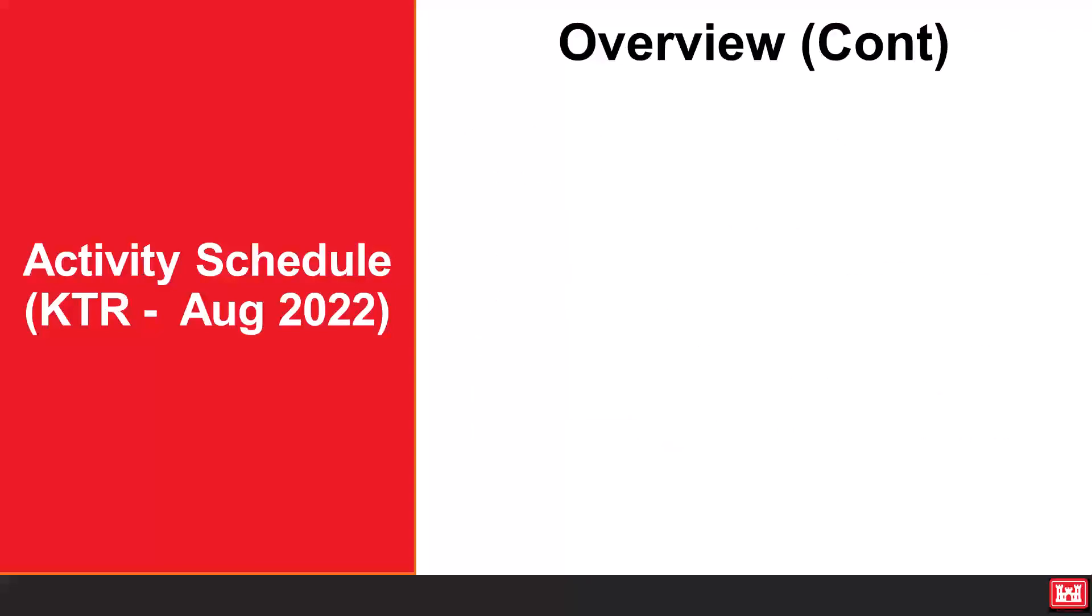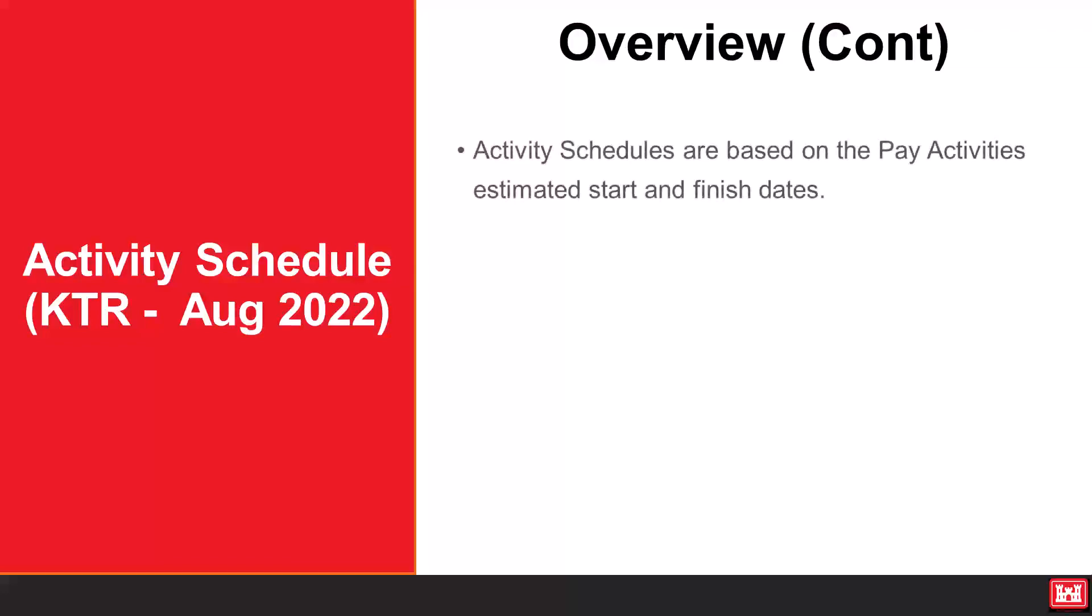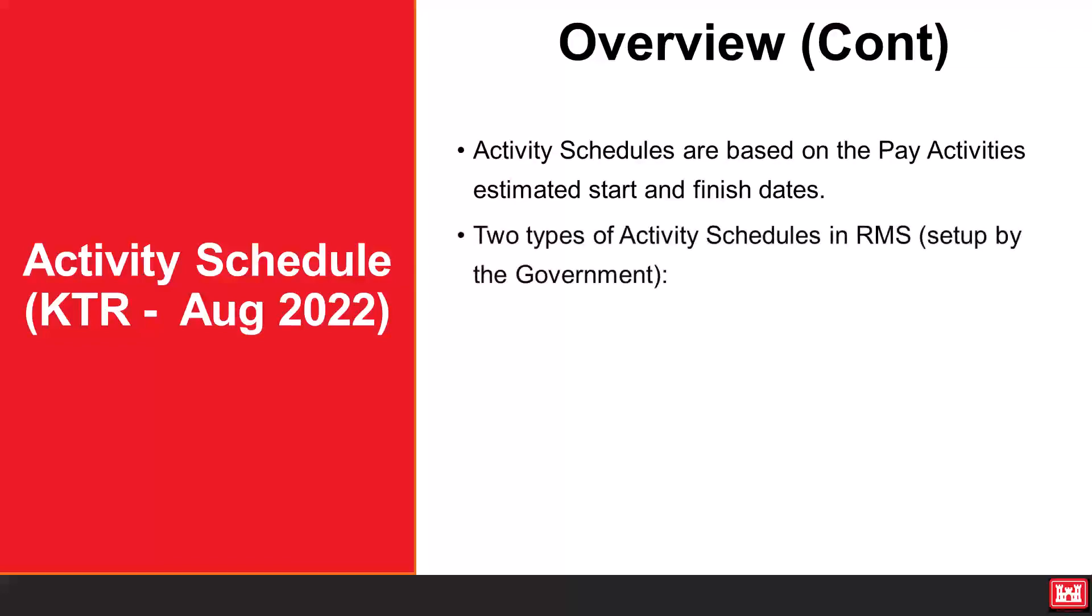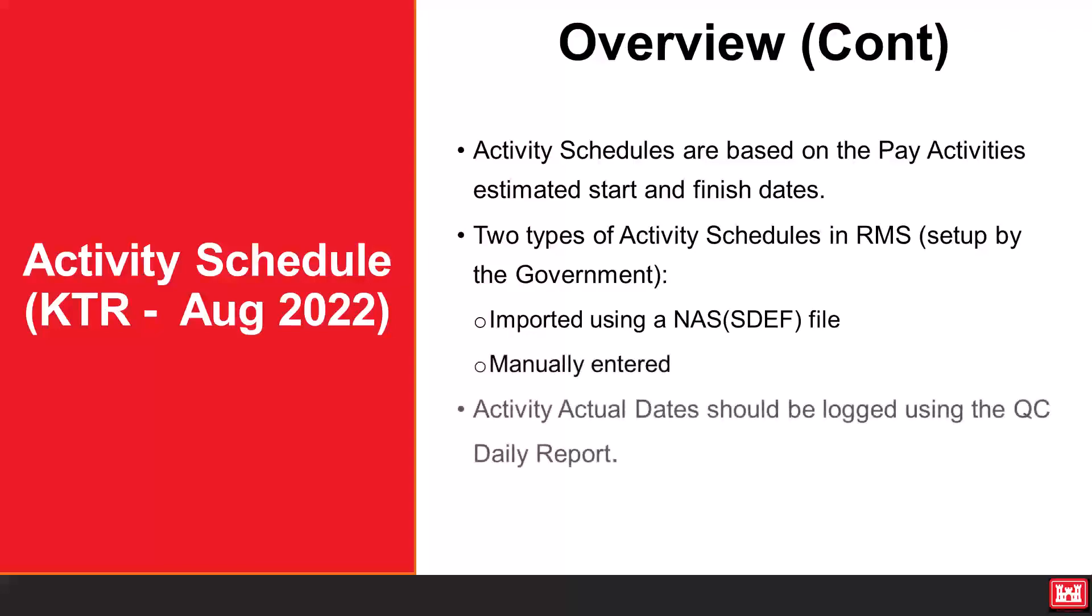Activity schedules are based on the pay activities estimated start and finish dates. There are two types of activity schedules in RMS set up by the government: imported using a NAS SDEF file or manually entered. Activity actual dates should be logged using the QC daily report.